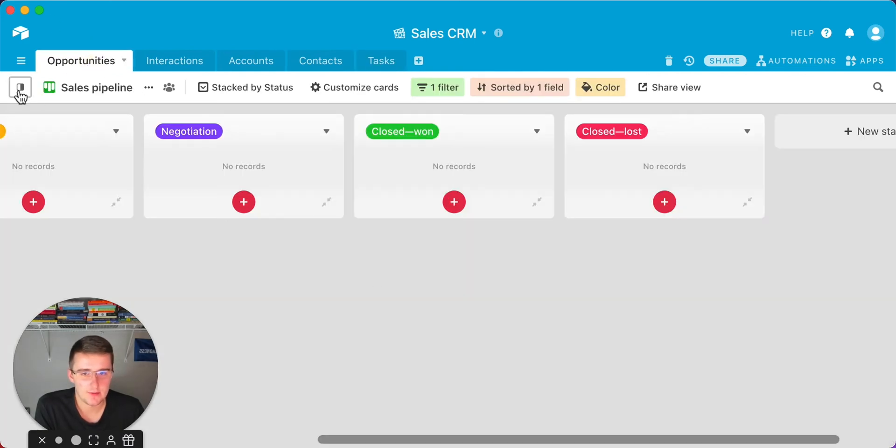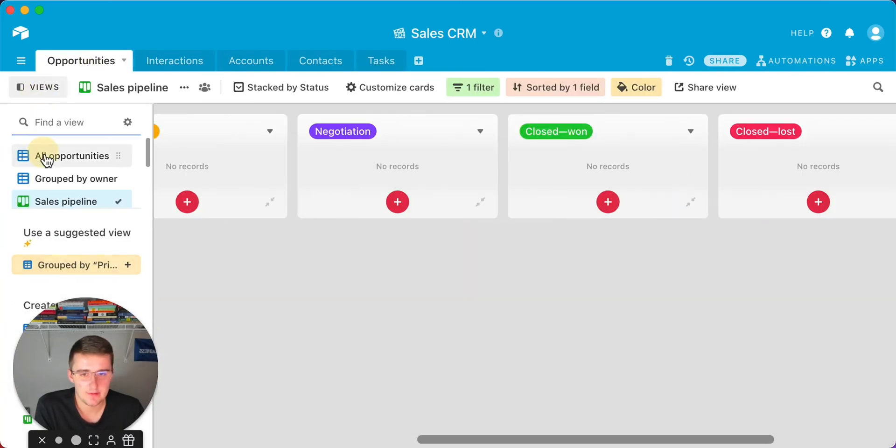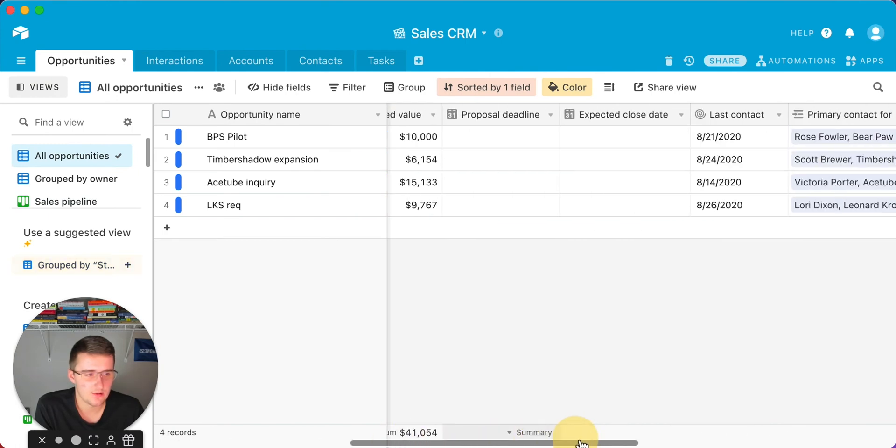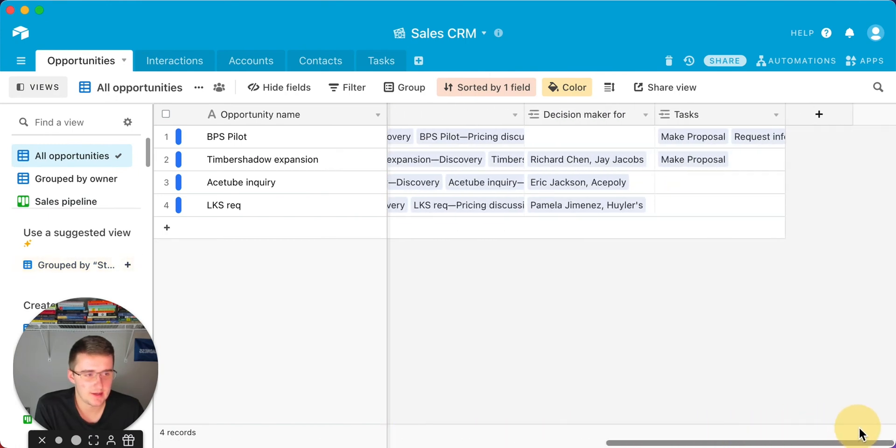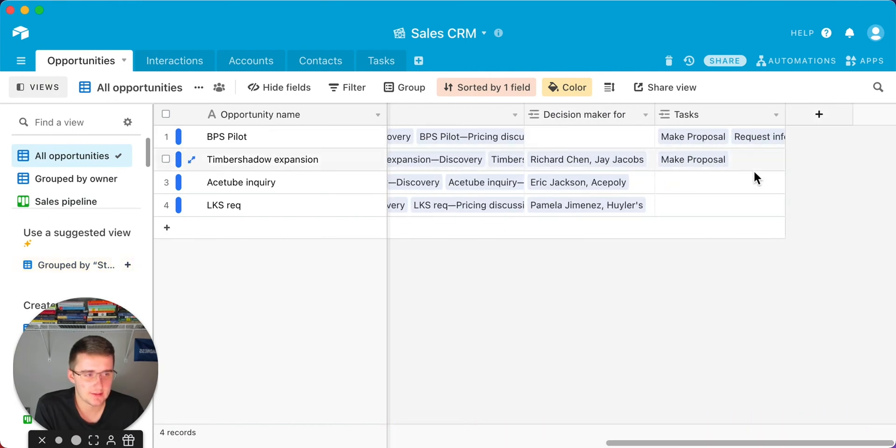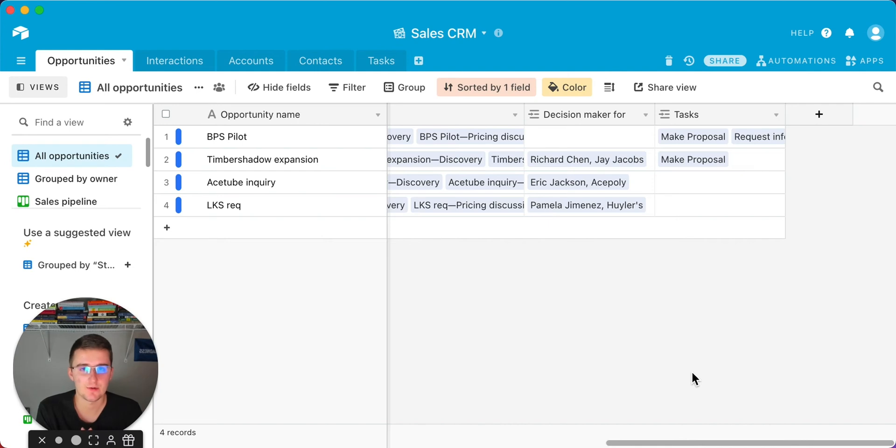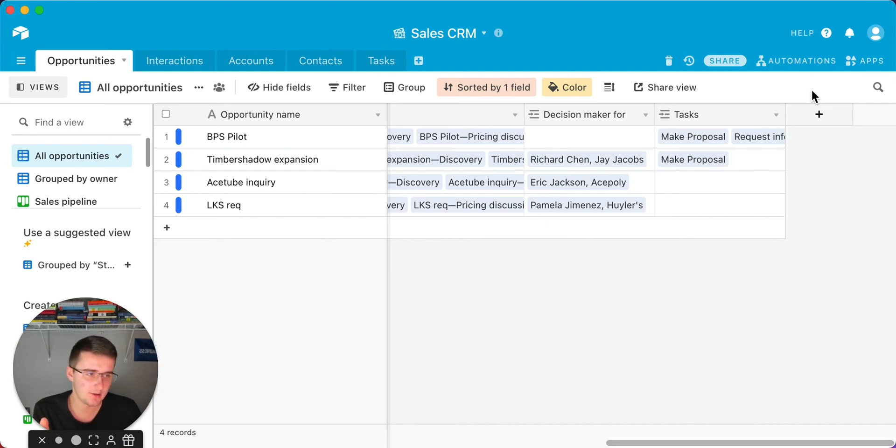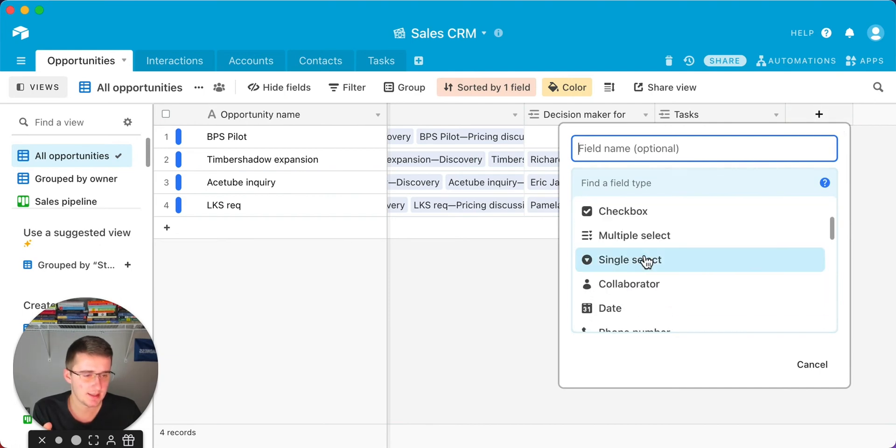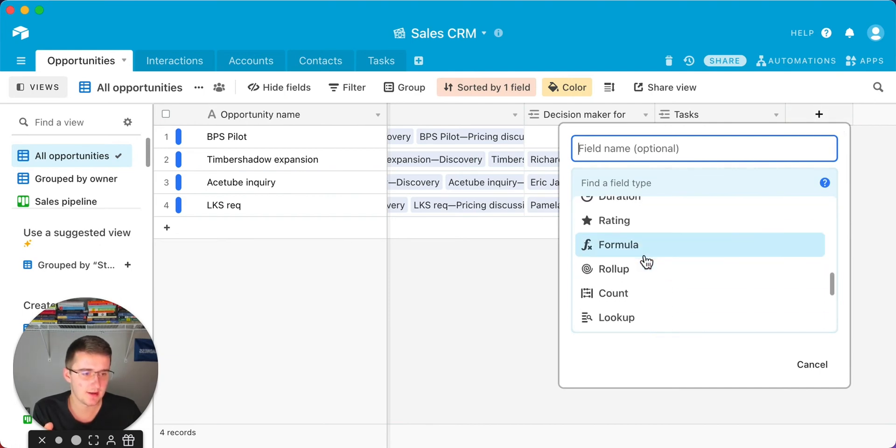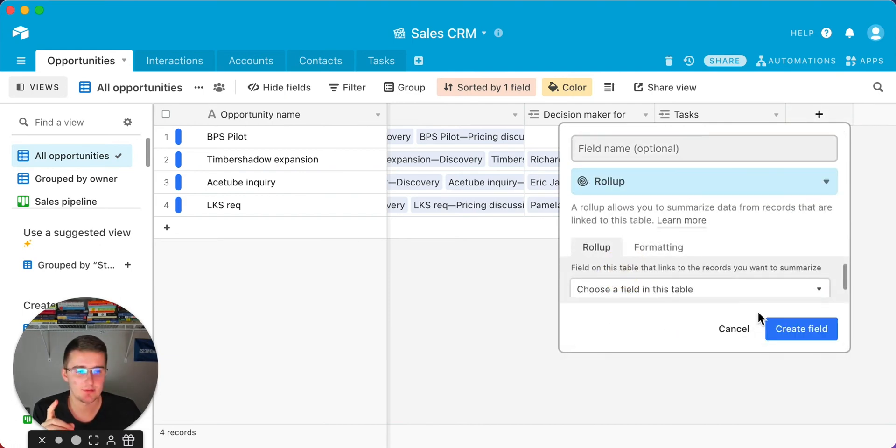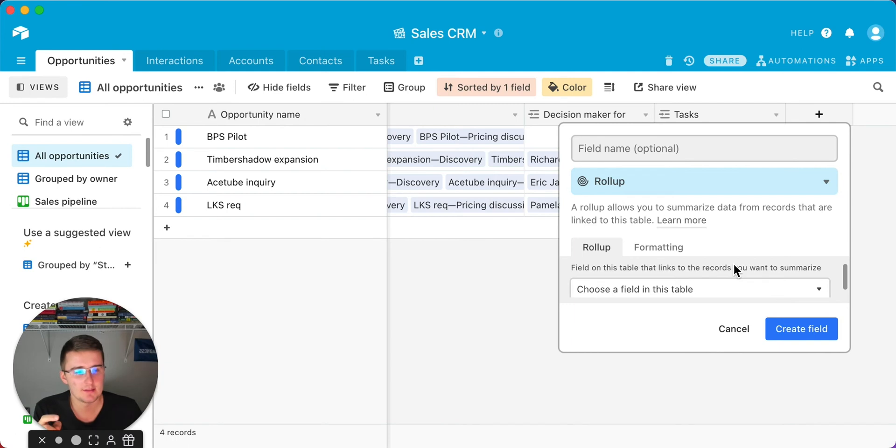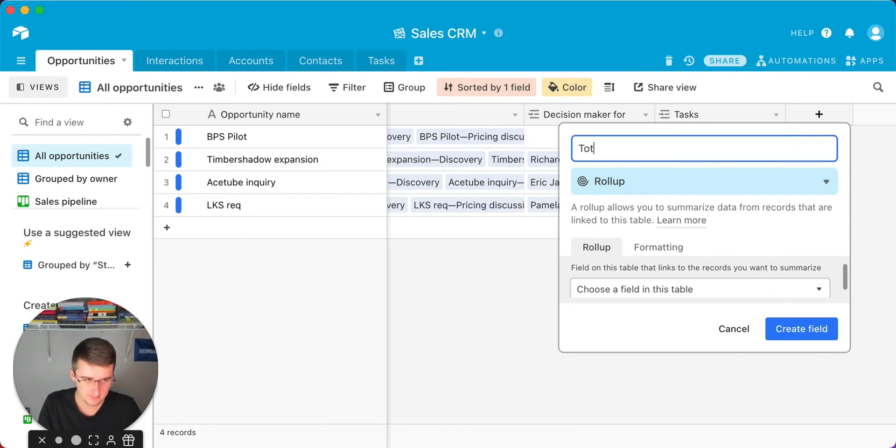If we go to a good view here, all opportunities, and we scroll all the way over to the right, we'll be able to see that new tasks field. If you want to see the total duration of that opportunity so far, if you want to see the total time spent on that opportunity, what you're going to do is come over here, click a plus, and then come down and add a roll up field. This is already assuming that you linked up these two tables. You have that linked record in the tasks table. Now you'll add the roll up field, and we'll say this is total time.